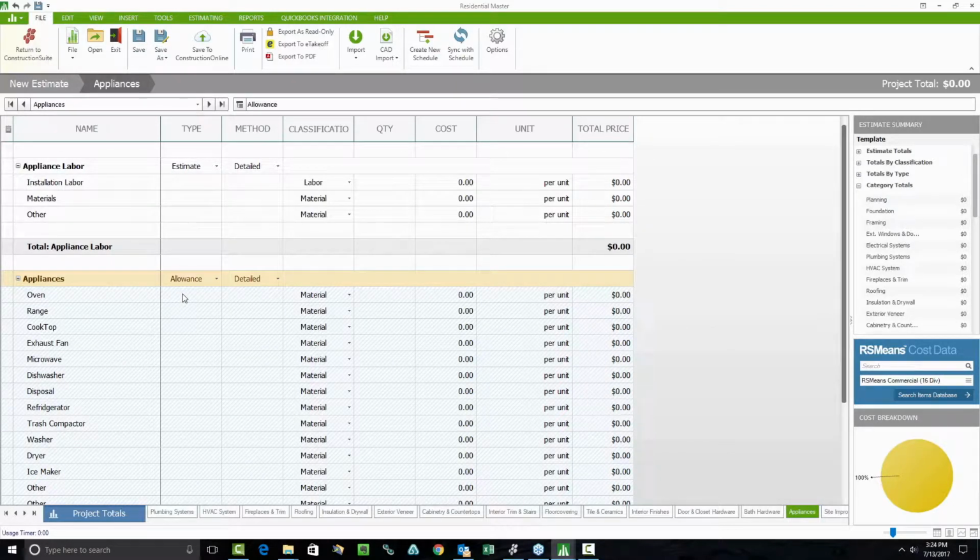You'll also be able to go into this section and start entering the spaces that might be subcontractor work, where you plan on doing just bids, lump sum values for those. So you might go in and take a look at the electrical section and set that one to a lump sum, which could be done by just clicking into the detail section and choosing lump sum from your dropdown.